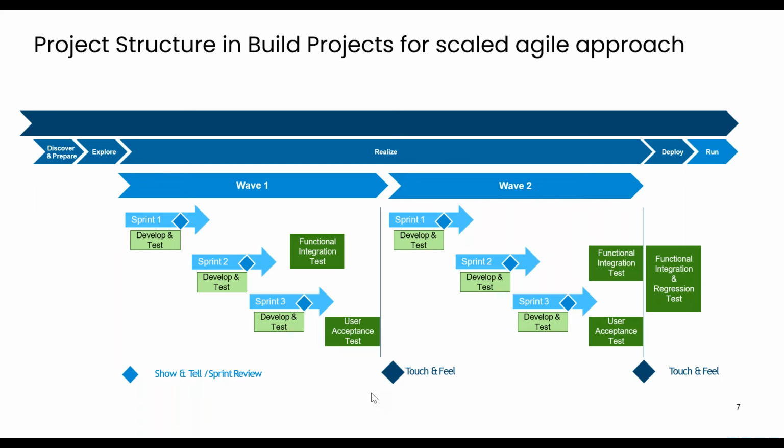The goal would be that after we have our scope and our requirements approved, for each one of the sprints, for a 3 to 4 week sprint, we would have certain items. In this case, our goal will be to have development and configuration items assigned to sprint 1. We develop those items, we test them, and then we move on to the next sprint. But the entire idea is that at the end of sprint 1, we would do a show and tell for the entire sprint.